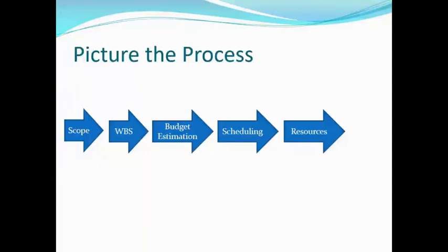And when we assign the resources, though, things can change. So be very conscious of that as you look at the materials for this week's chapter. We're looking at the resources, the materials, the equipment, the people, whatever is going to be needed to complete each work activity. And so as you assign resources, if you have a resource that's required for the project, but that resource is not available, that can potentially throw your schedule off. So it's going to put us back in the scheduling mode. Then from there, we pretty much move to execution.